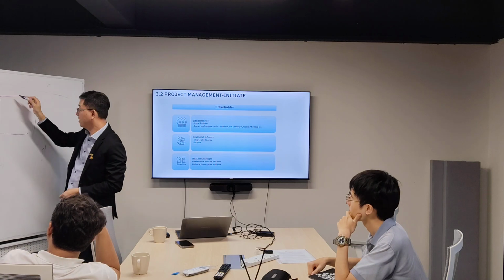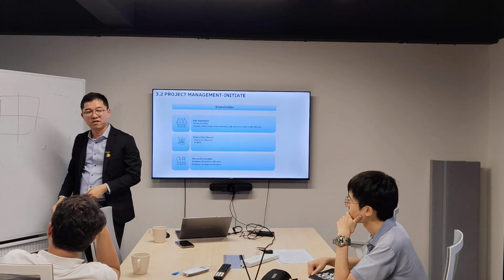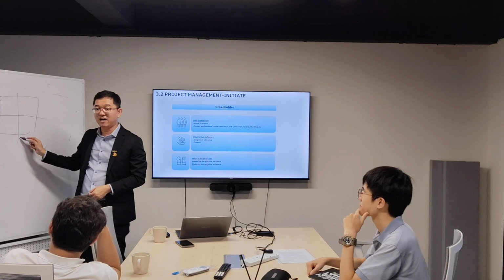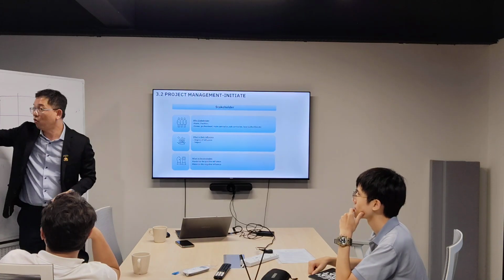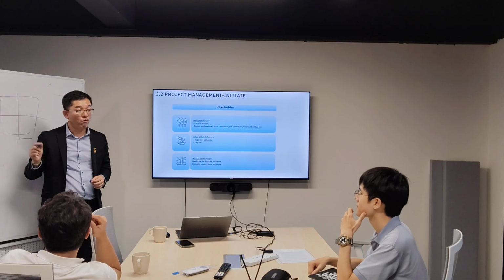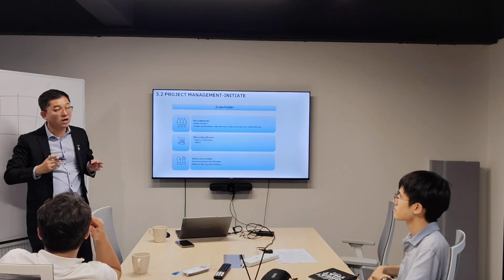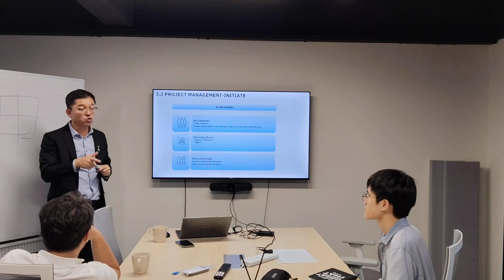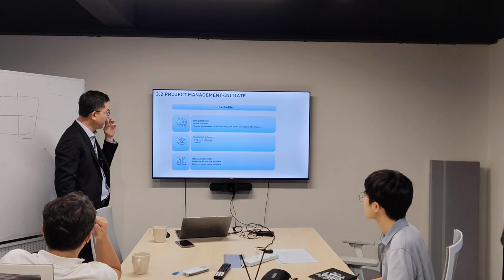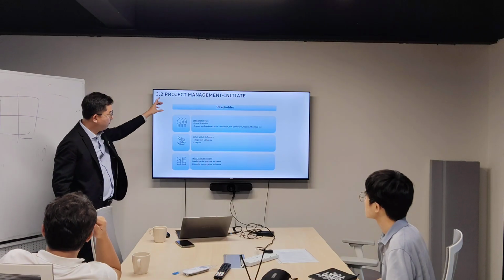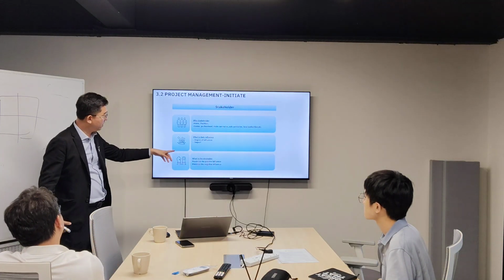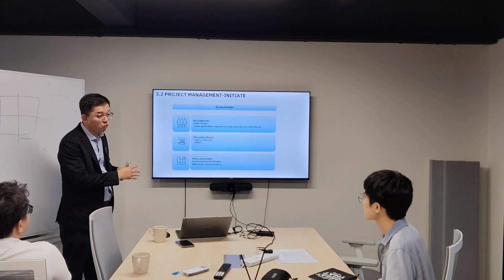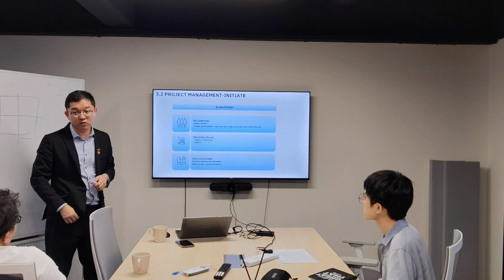You guys know that? So you need to come with this table and distribute out who are your stakeholders and what is their influence and how much level that they influence to your project. Okay? And of course, from this table, you need to list out the strategy, how you use their influence to make successful of your project.